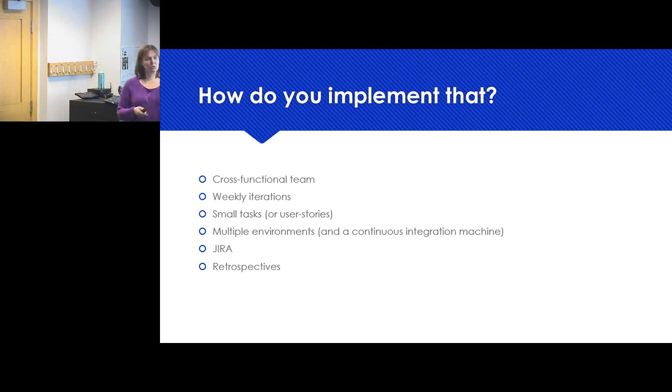And so we'll spend that day, and it's no more than a day, or however long we say, to just do some investigation. Maybe it's actually a spike, which basically just means I'm going to write some code, or go out and try to find some different libraries and try them out, and then I'm going to throw it away. The reason for doing that is you've learned something, and the next time you actually go to do it, you can do it better, you understand it, you can get a better estimate, and everybody feels better about it.